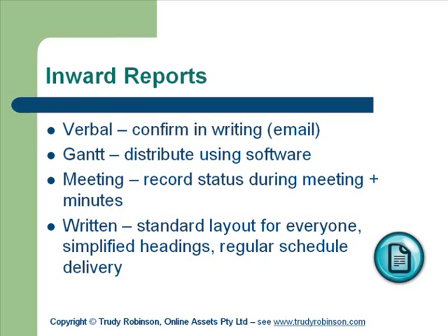Obviously, one of the most frequent ways of giving updates is by weekly or regular meetings. And as I said to you, I think in week one, it's usually better to have your meeting midweek, because that way, if you have it on the Friday, it's not out of date by the time you get something out on the Monday, because something's happened over those two days. Or the other way around, you're getting it on the Monday, people updating you from the Friday. So it's usually better to have it midweek and get the people into the room and say, where are you at, what are you doing?